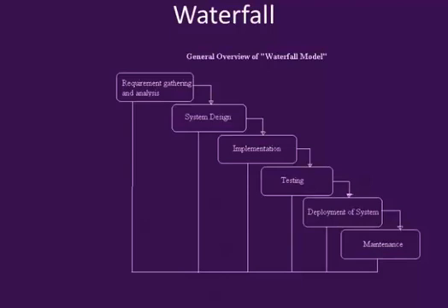A critical path can be found to determine limiting factors. A review at the end of each phase can result in the abandonment of the project. The customer is only involved in the specification and after deployment. The maintenance phase can be extended since it often involves changing the code to give the customer what he actually wanted in the first place.